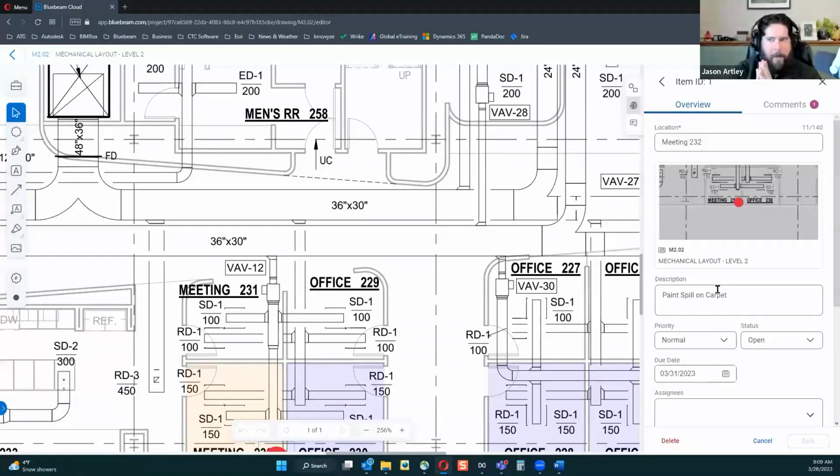See, that's the thing. This cloud environment is where you would invite the contractor and they would just see everything as you go. So if the contractor is part of the team, as you add that punch list item, they're going to get notified. So you don't have to wait till it's done. They can react faster, right? And that's one of the reasons that we're trying to enable more of these cloud workflows: let's skip so many of the emails and exporting. Let's get everybody on the same page at the same time. So yes, you can create